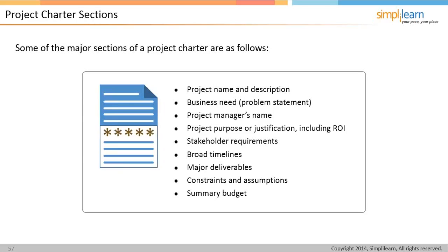By the way, as we go through the define, measure, analyze, improve and control phases, we anticipate that each major deliverable will take place, maybe it's 30 days per phase. And we anticipate 150 days to be completed with this project. So 30 days through the define, the measure, and so on. Some may go faster, some may go slower.